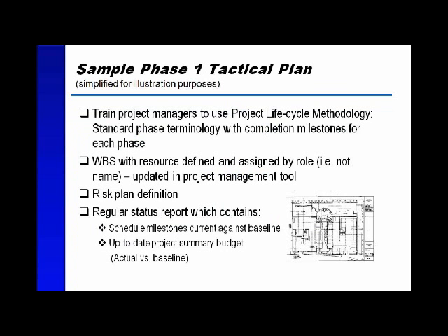What might a simple phase 1 tactical plan look like? And this is truly simple, simpler than we would probably recommend, but simple is good. We might train the project managers to use that life cycle methodology, that standardized phase terminology that really provides completion milestones for each phase. We would have a realistic work breakdown structure with resources defined and updated in the project management tool based on that project life cycle methodology.